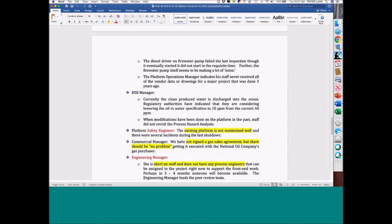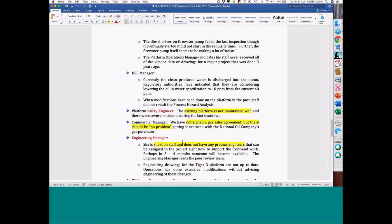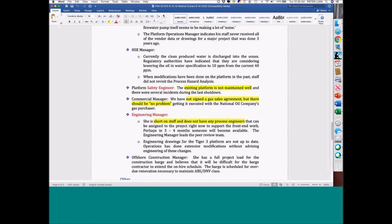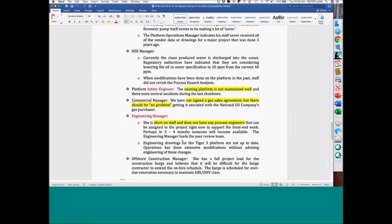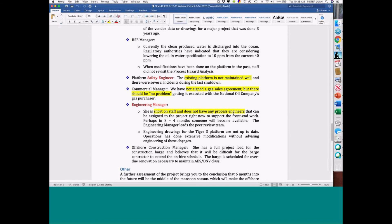And the commercial manager — I know no one has ever heard this — says: we have not signed a gas sales agreement, but there should be no problem getting one executed. Well, just think about that. You're a project manager, project engineer — you need technical people. So you go to the engineering manager, and what do they tell you? Short on staff. They don't have a process engineer. You need a process engineer.